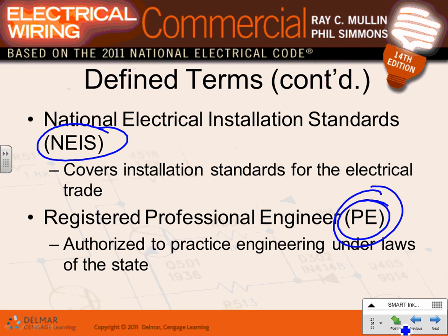Most of them do, but if it doesn't, then in the state of Minnesota, you go to the Department of Labor and Industry, and they list many, a list of names of registered professional engineers in the state of Minnesota whom you can hire. I'm not one of them. You hire them basically to study this piece of equipment and sign off on it that it's equivalent to the UL listing.